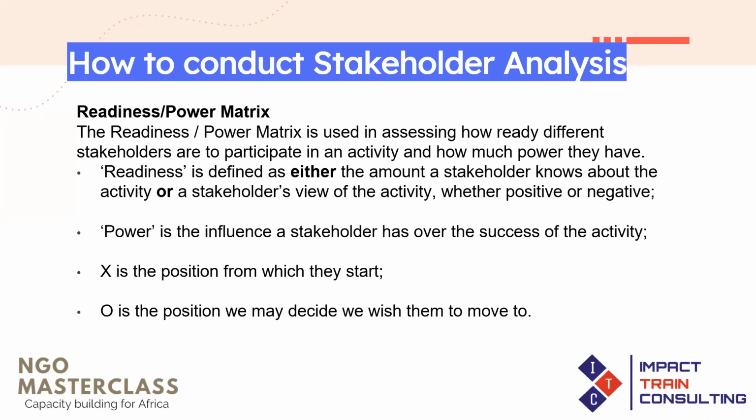Now, in developing the readiness and power metrics, you're going to be using two things that are very key, which is X and O. X is the position at which a particular stakeholder is, and O is the position to which you may want to move them. So for instance,